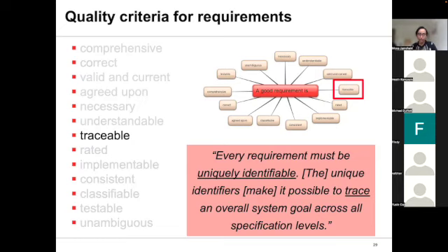And a very good advantage that traceability gives you is when it comes to debugging your application. So for example, you come up with your first release of the product, and you take it to your client, and then there's something that they highlight, that this exactly was not my requirement. So just imagine how much advantage you have when you already have a unique ID attached to that requirement, and that is going to help your developers and testers debug the software application by following that particular requirement journey to see where things went wrong.